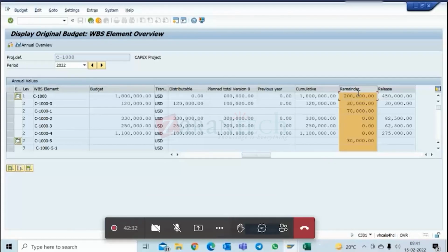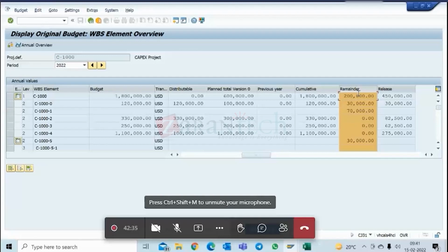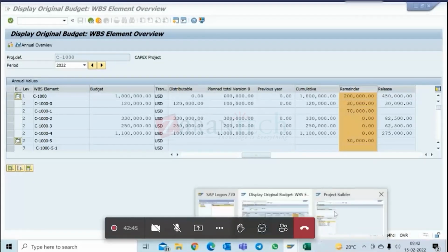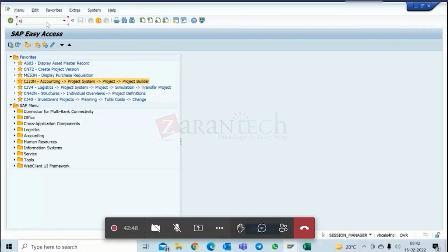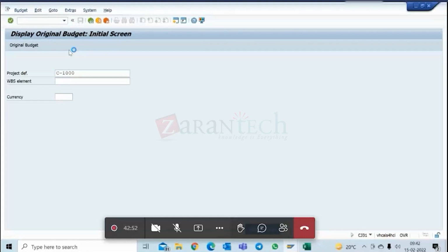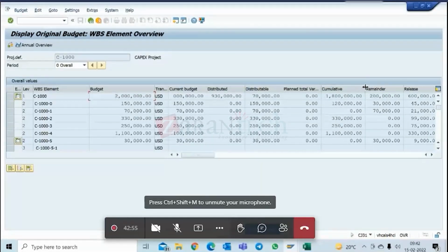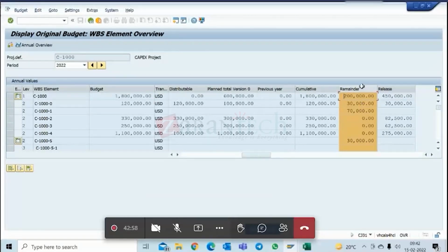Okay. Again, I will just go into another screen and keep overall over there. Khalid, why I am pointing is because, see, if you go to the same screen, see here. We have to go by their definition now. We don't go by our definition. The 82,500 is also released, right? Then why is it not showing in remainder, and only the 30,000 is showing? That is why I'm saying this remainder is not the unreleased amount.